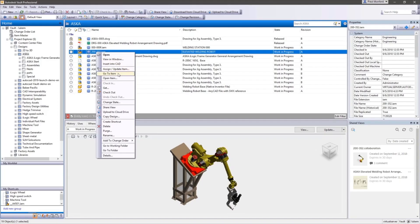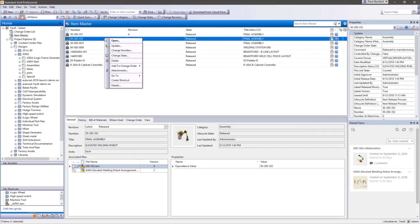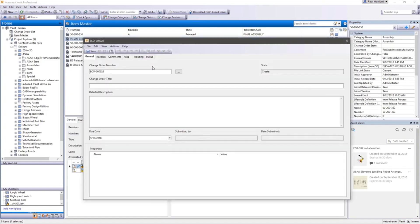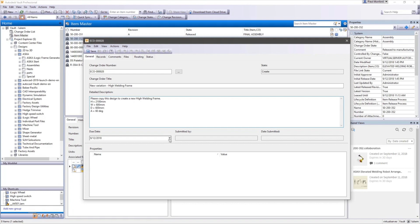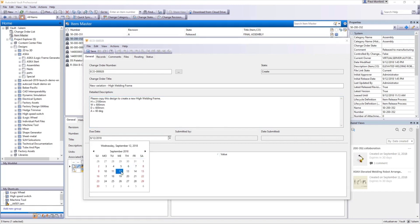Autodesk Vault provides effective and efficient management and tracking of engineering change orders. A change order number is assigned automatically by Vault. You provide a change order title, description, and due date.